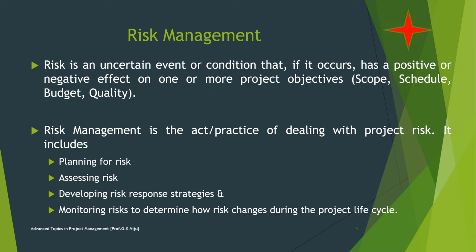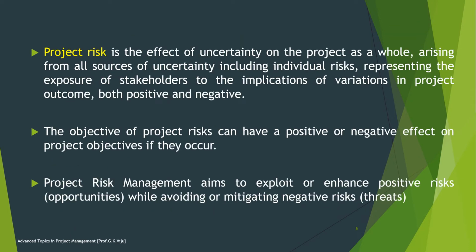So risk management is the act or practice of dealing with project risk. It includes planning for risk, assessing the risk, developing a risk response strategy, and monitoring the risk to determine how the risk could change the project life cycle. Project risk is the effect of uncertainty on the project as a whole, arising from all sources of uncertainty, including individual risk representing the exposure of stakeholders to the implications of variations in project outcome,